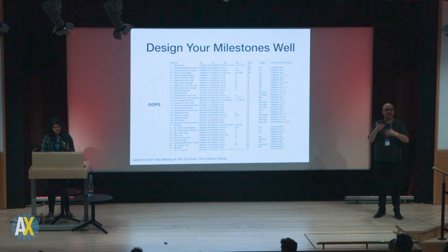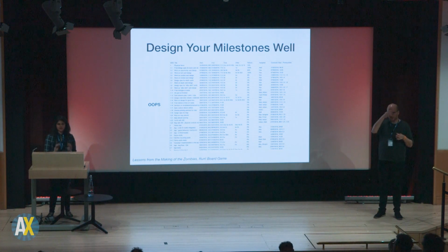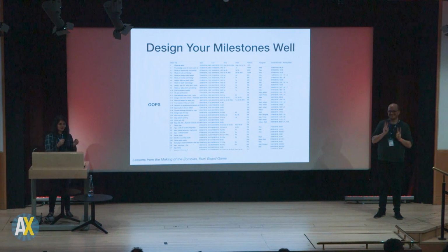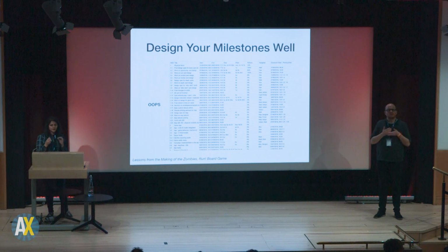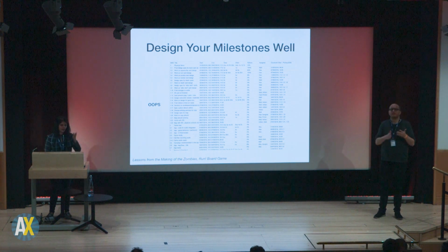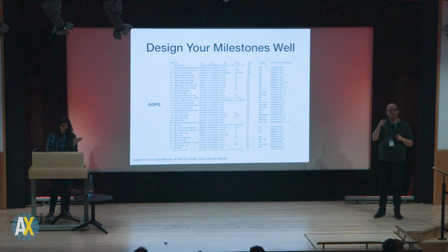So the biggest lesson we learned from this was make sure you have a production plan that everybody can see, and don't try and protect your creatives from the production plan by saying, you don't need to know that, it's okay, I'll just tell you what you have to do. Don't do that. Make sure everybody can see where you are, what you need to be doing, where you're going